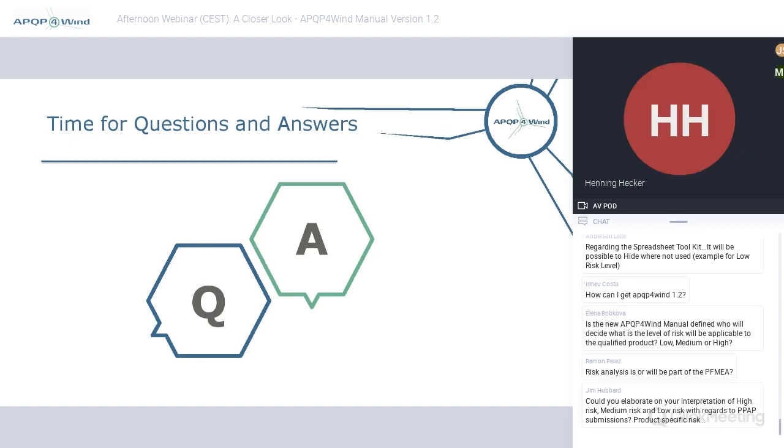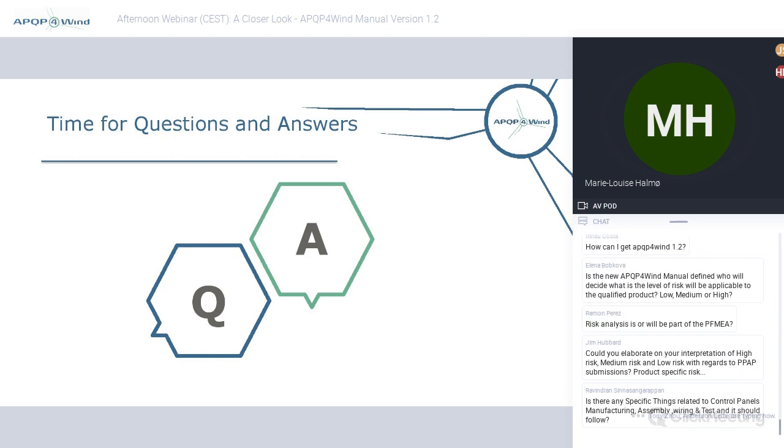Now in the manual, it says as a minimum. If the customer identifies something as high, then as a minimum it should be considered high. On the other hand, if the customer says it's low, but as per the supplier's design or risk assessment it falls under high, then you can treat it as high, because this manual states the minimum requirement.